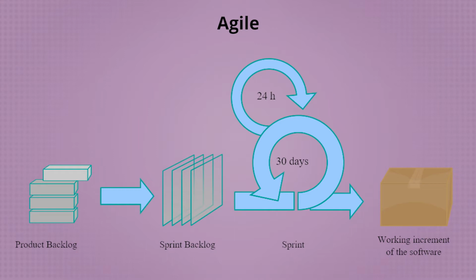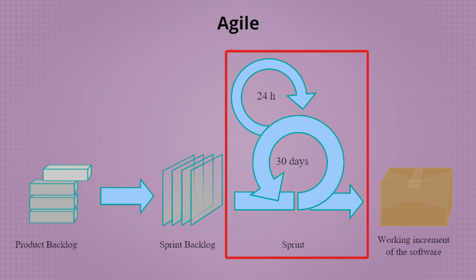Just like in traditional approaches, requirements are still present. There's design, there's development, there's testing, there's deployment. However, each of these activities is completed within that small time box, and that time box may be only 2 to 4 weeks, as opposed to months or years.